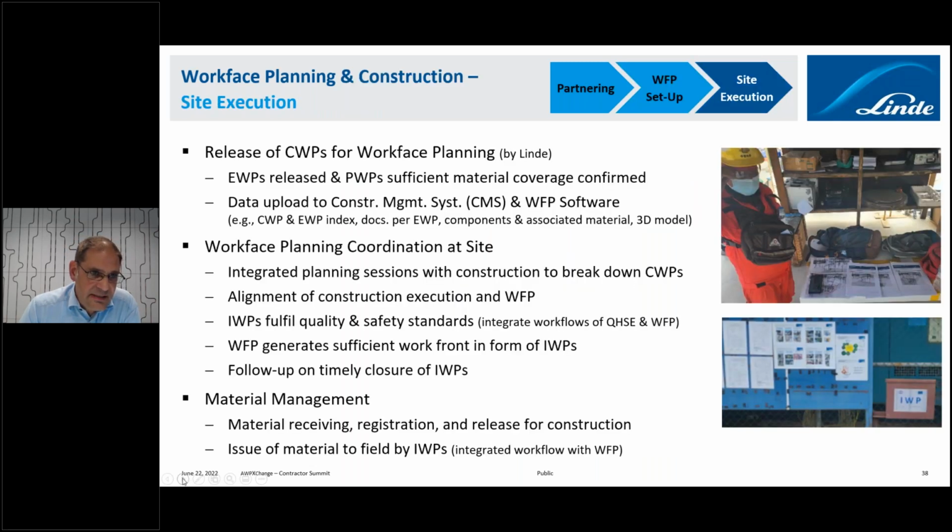When we come then to site execution, site execution really starts with Linde releasing the CWPs. I think we have seen that also in the Shell video. That's the starting point for construction. So it's about, are the EWPs, the documents, complete? So formally released, and also the procurement work package, so the material for the CWP.